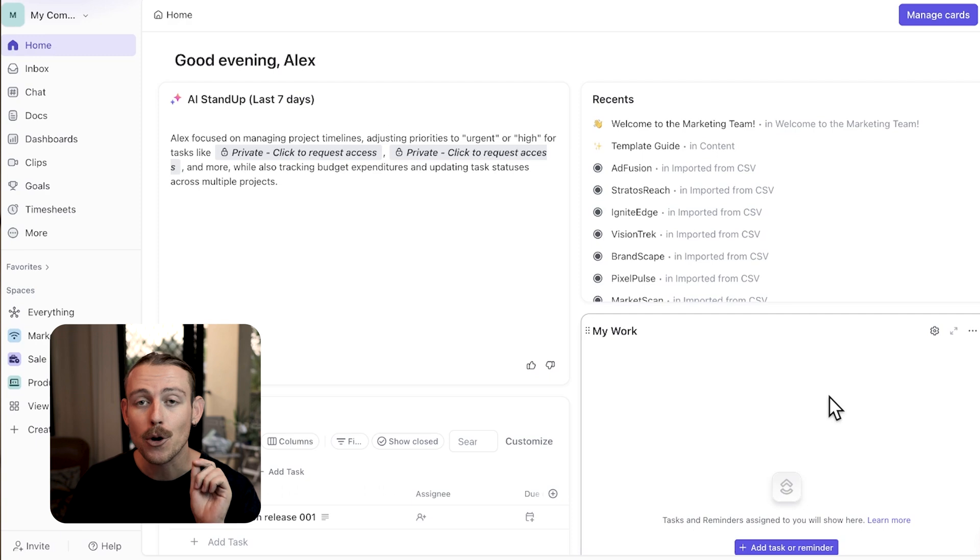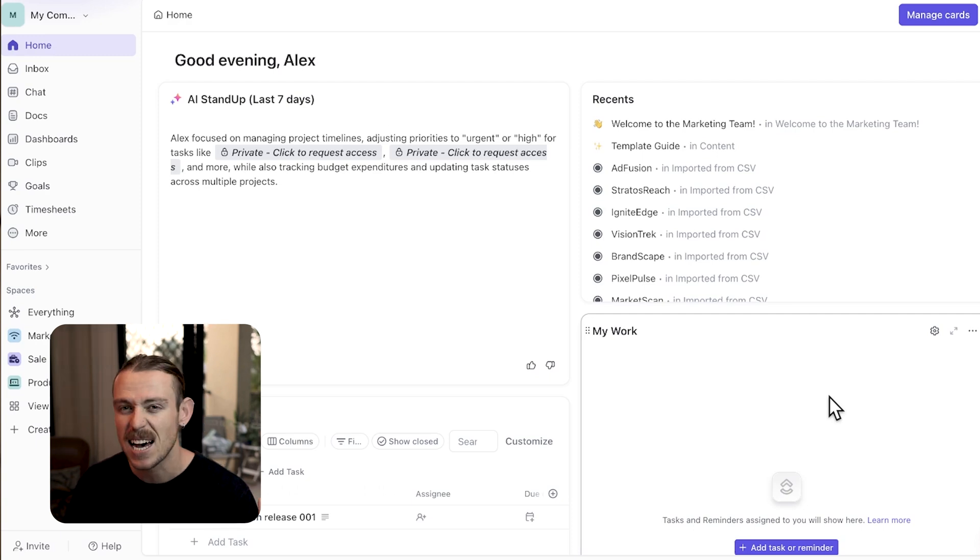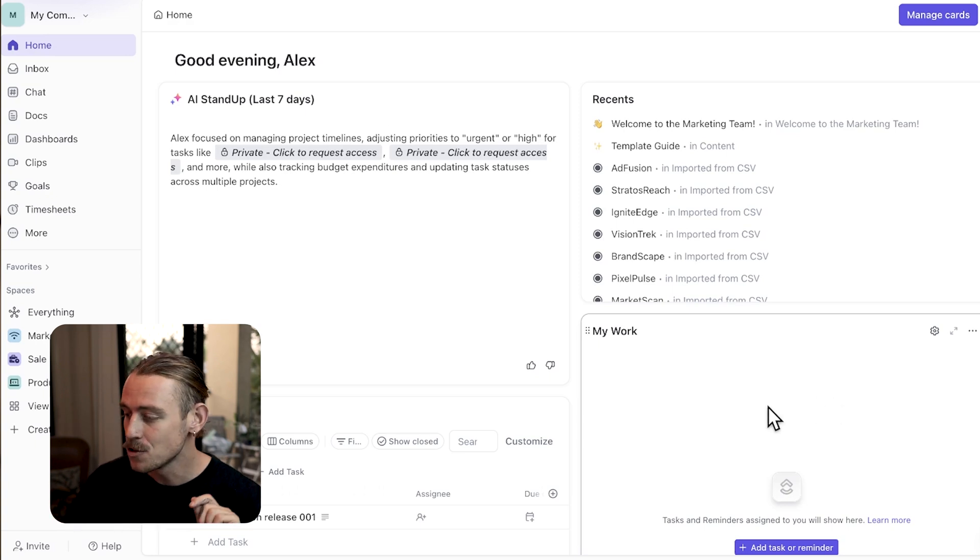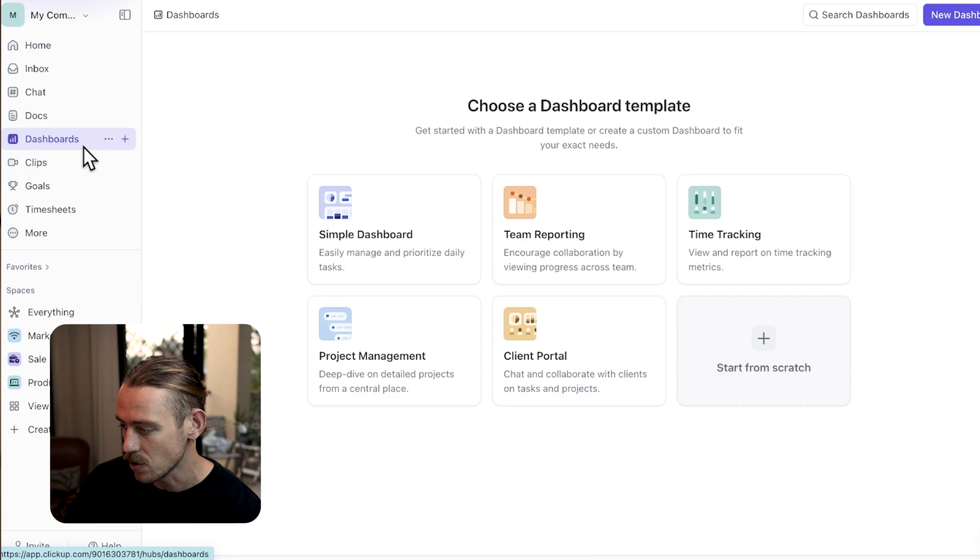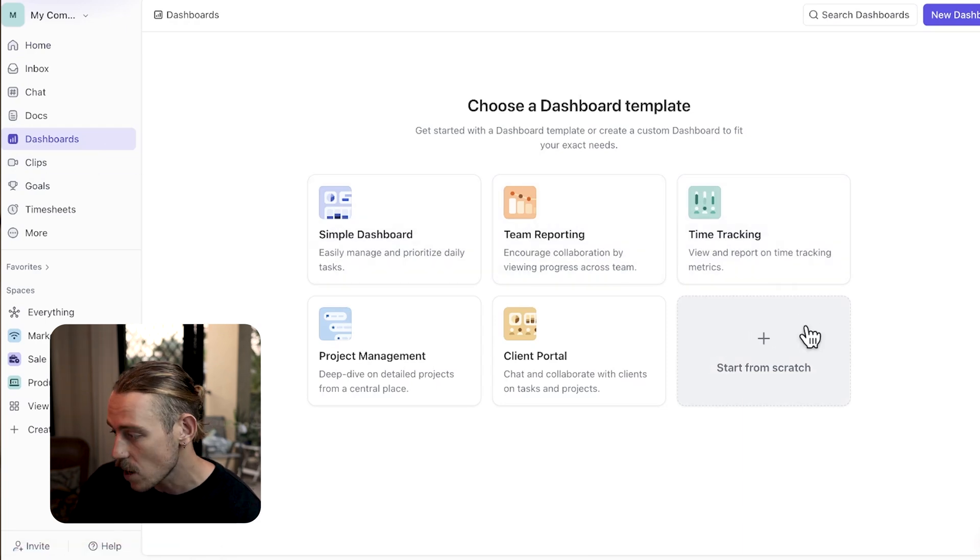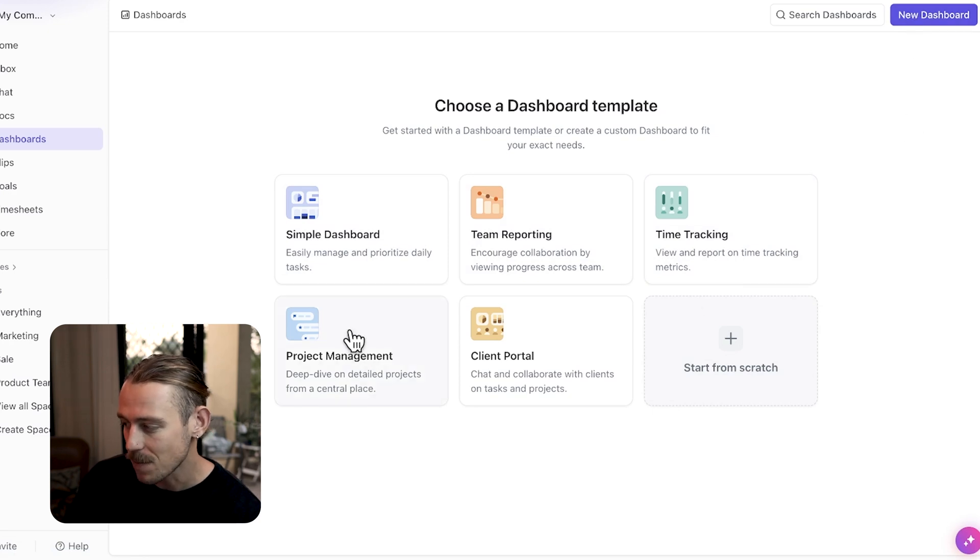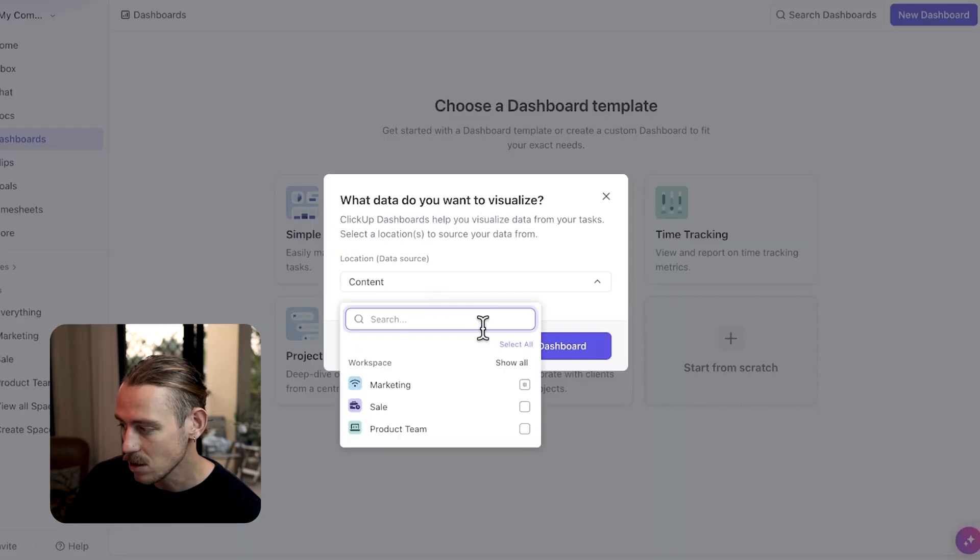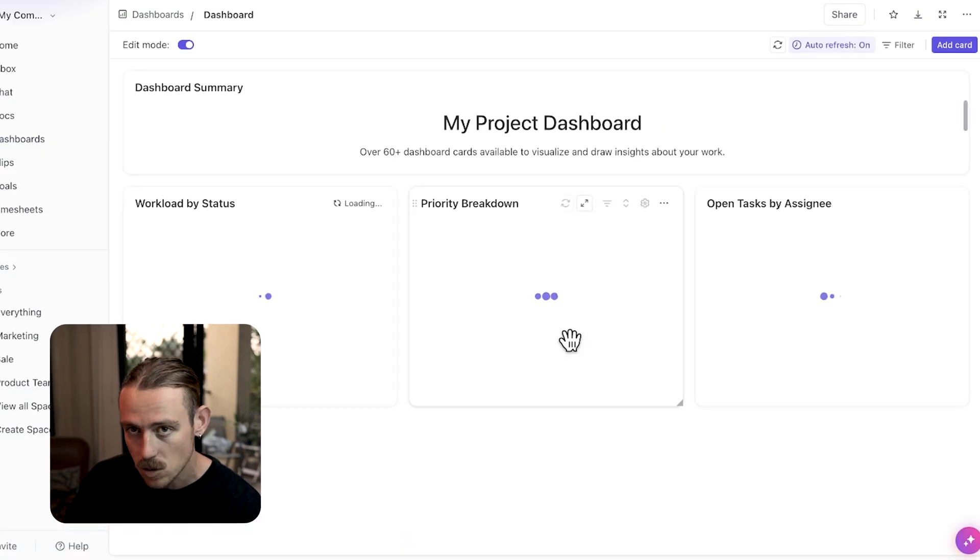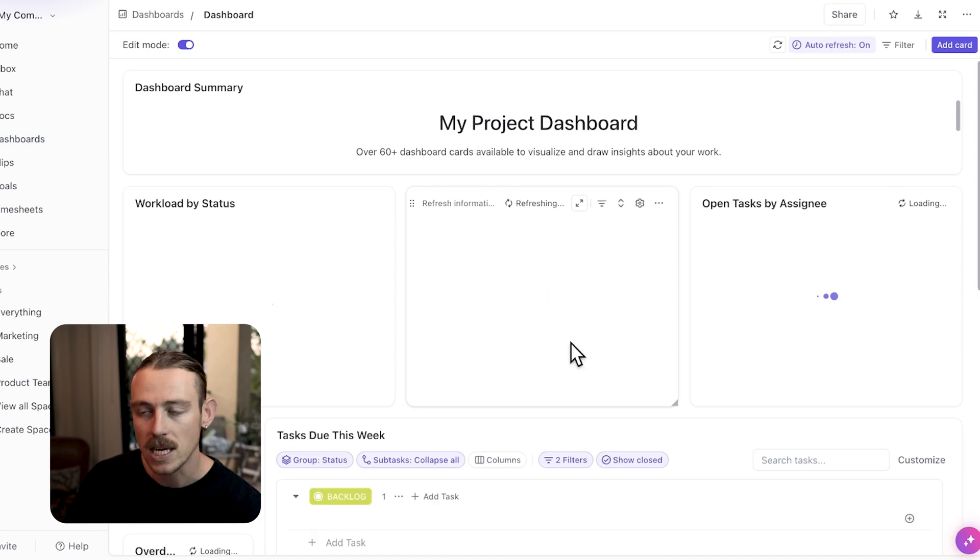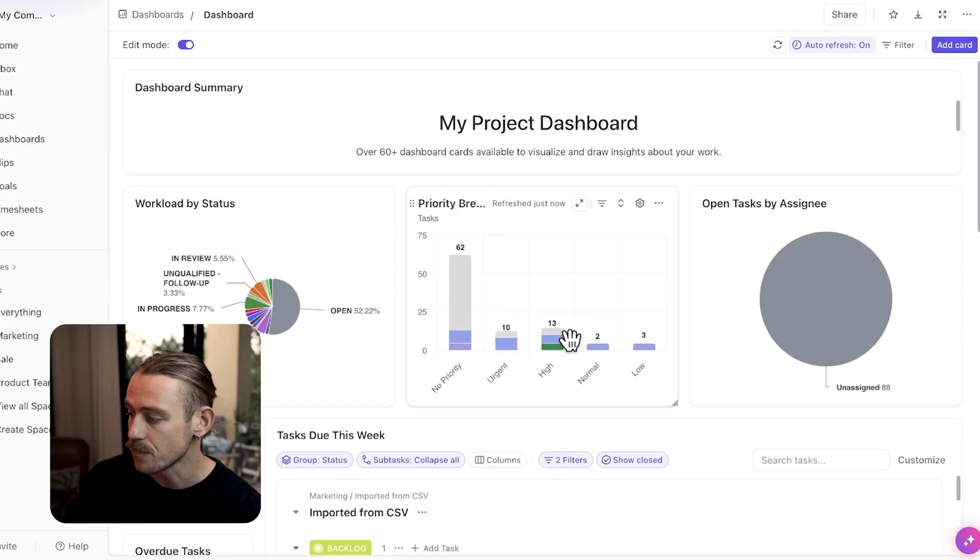Dashboards are a great way to collaborate with your team and visualize how your projects are going, how your customers are being onboarded, and much more. To create a dashboard, select dashboards from the left side panel and then select a template or start from scratch by selecting new dashboard in the top right. I'm going to select project management so we can see how our team is coming along in our project tracker because you will need to either select an entire workspace, a space, or a list and pull in that data.